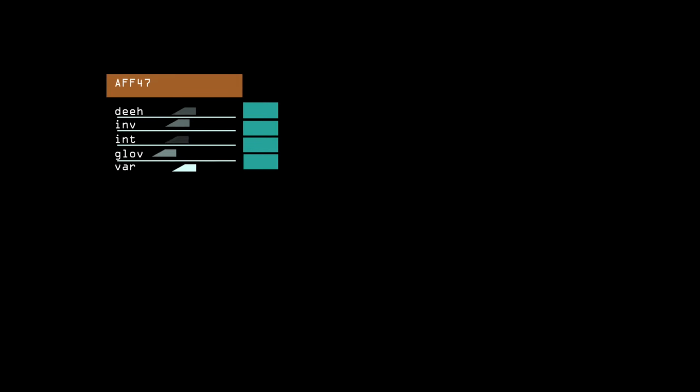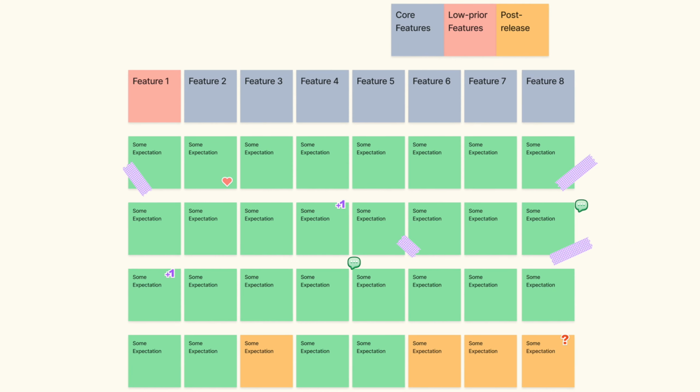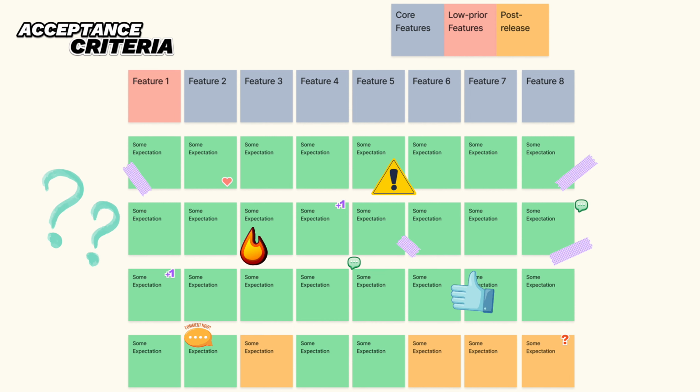There is no silver bullet that can help to define the best way to gather requirements. Mainly, it depends on the personality of each individual involved in the process. In practice, a good way to define what is needed is to go off-site with decision makers and go step by step over each user story on the map and talk in person about ideas, vision, and personal feelings. As an output from that event, you as a manager will receive feature statement elements with a detailed description of what should be delivered and what expectations are placed on the team. A simplified version of acceptance criteria.